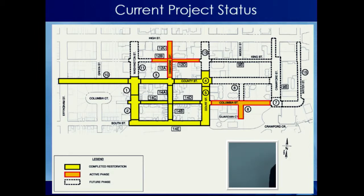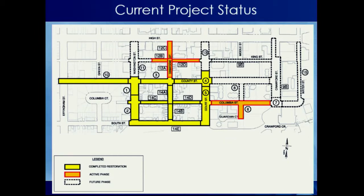Up here, Dinwiddie Street is our phase 12, and that should be completed early August. The Columbia Street section in the lower right, phase 6, we expect to be complete by early September. One of the things we've done is work very hard at communicating — one-on-one meetings with business owners and residents, a newsletter, city website, PCTV. Our project inspectors are out there all the time, and whenever we get a complaint, we try to deal with it right then.